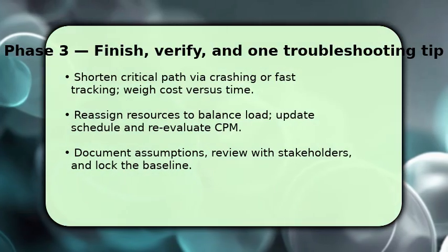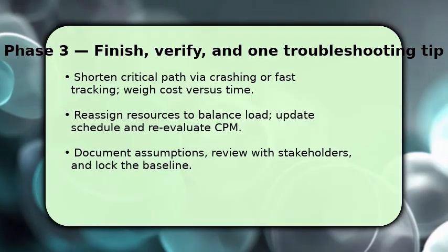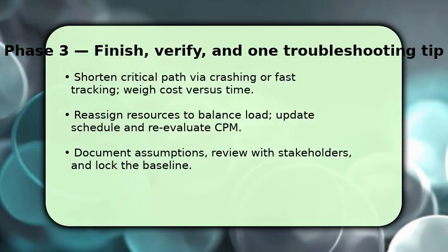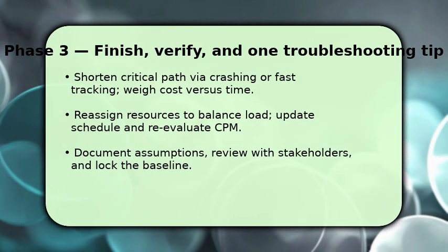To finish, target the critical path. Shorten tasks through crashing or fast-tracking where cost and risk permit, because reducing critical tasks directly cuts project duration.